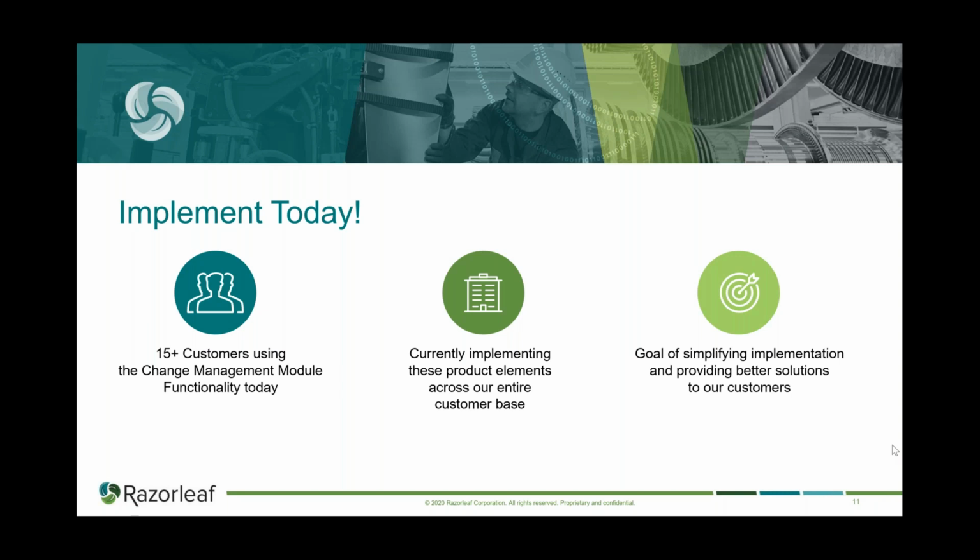In this area in particular, we can write some pretty great reports that help customers capture what that ROI is. So that includes closure of ECOs, the length of an ECO from start to end, how many of the change orders roll up to quality incidents, and then just tracking as a business how many change orders we have open, closed, and in what state they're in.